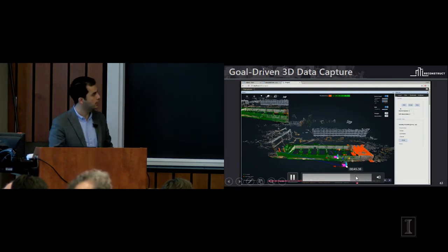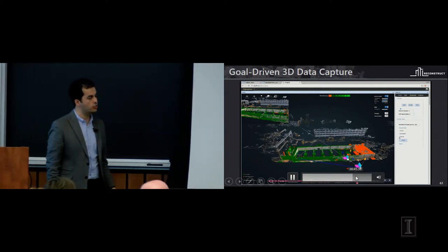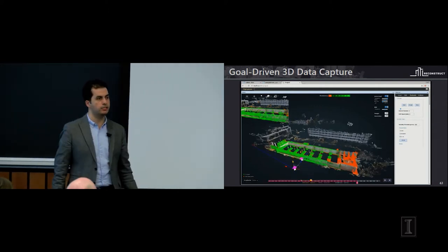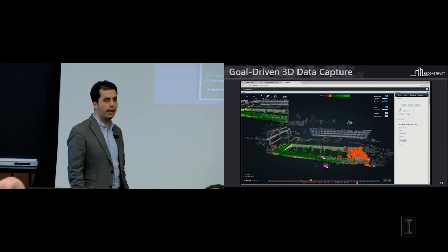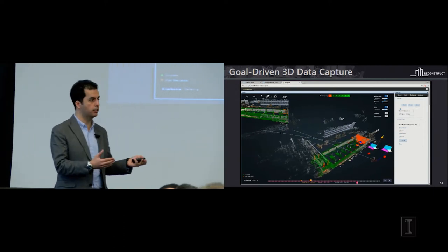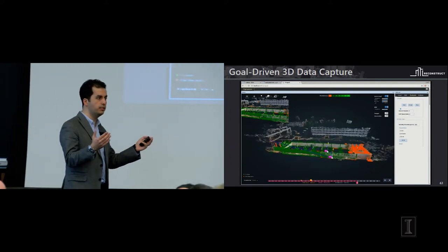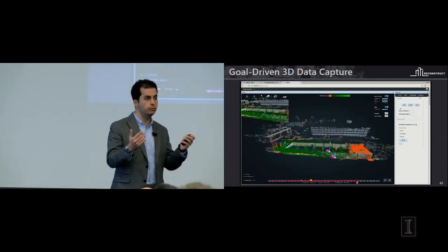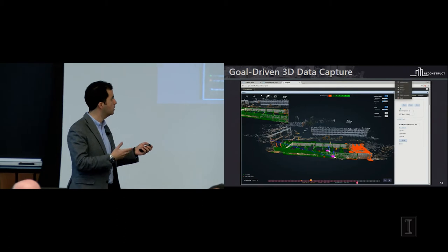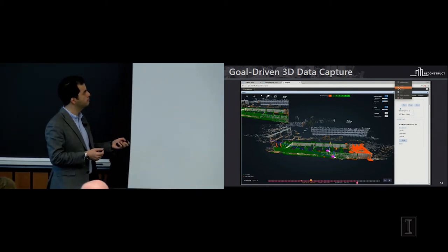It would be simulated. And before a drone is actually operated on a job site, we can color code elements showing whether this drone operation would actually capture every single thing that is happening on the job site. So you can guarantee that the drone operator will show up on the job site, and within 15 minutes, everything is done. And you don't need to bring this person back on the job site to do another one because the data capture was not complete.